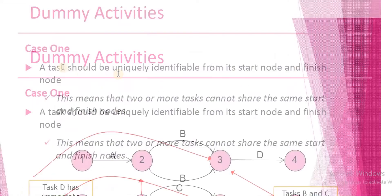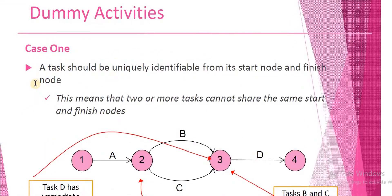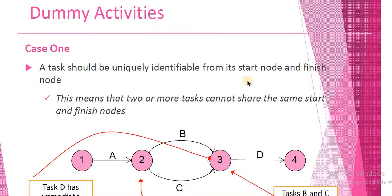So what was Case 1? This task was uniquely identifiable from the start node and the end node. This means that two or more tasks — in other words, multiple tasks — cannot share the same start and finish nodes.